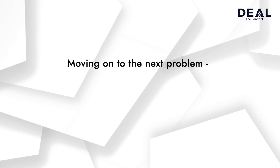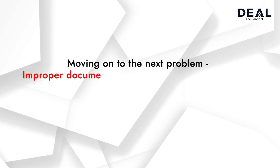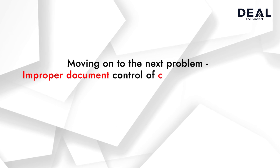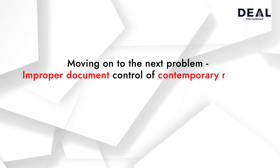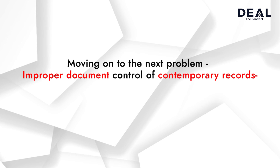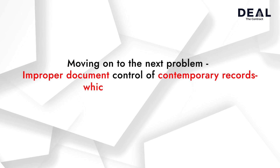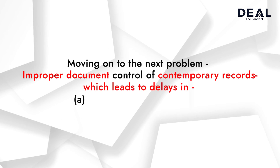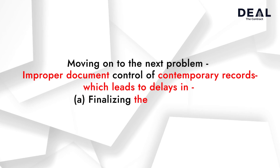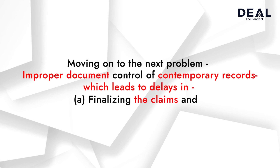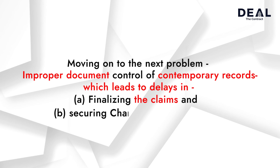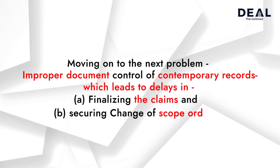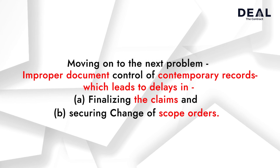Moving on to the next problem: improper document control of contemporary records, which leads to delay in finalizing the claims and securing change of scope orders.